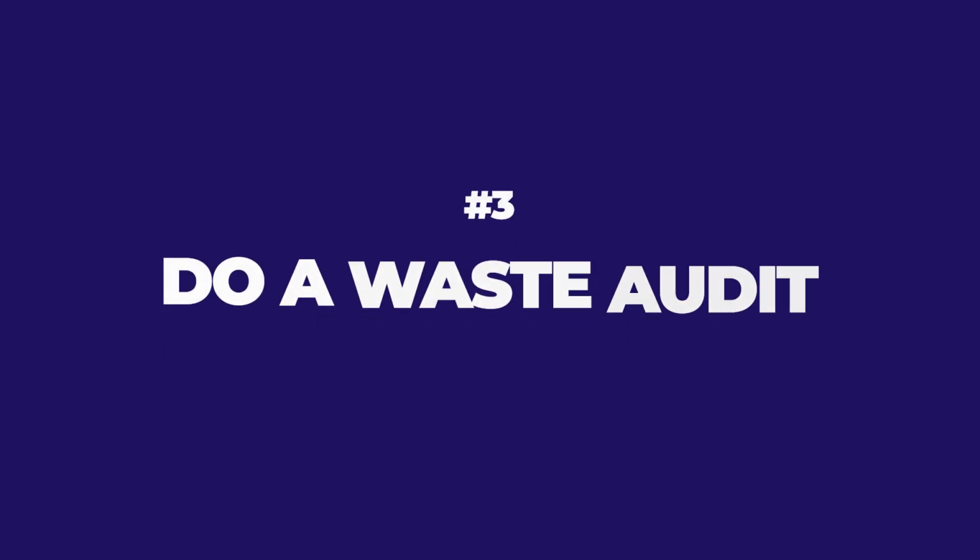Number three, do a waste audit. I love this. I've heard of 5S walks. I've heard of 5S audits. I've heard of 8 waste audits, 8 waste walks. Currently, we're like weeks away from being done with the book Tact, Steering and Control. And I'm literally talking in the book right now, like on the plane to this video shoot, I was writing about how zone control walks require a superintendent or leads or a group of people to go out and look at how the zones are progressing in a flow and to look for things that go against that flow, which waste is one of them.